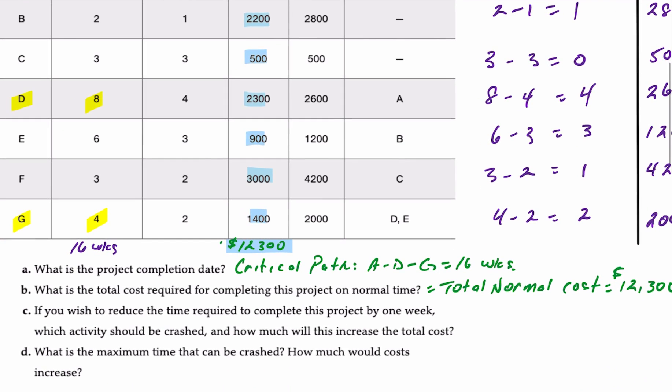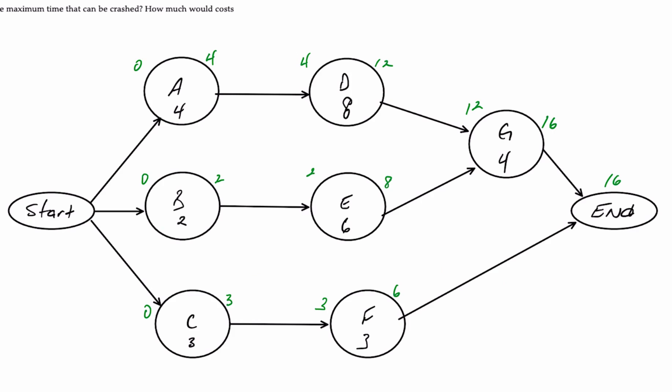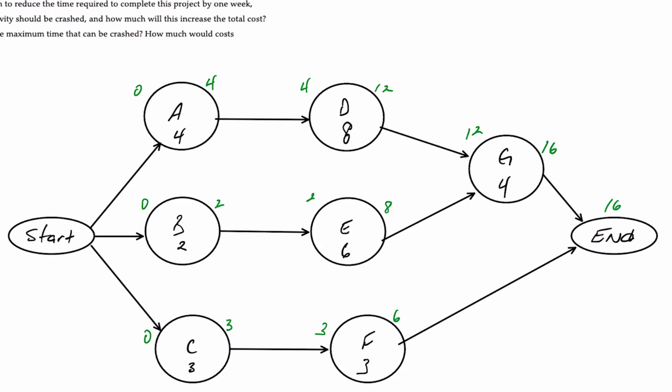Our objectives for the question are: first, determine the project completion date by drawing the network diagram. A, B, and C have no predecessors. D is preceded by A. E is preceded by B. F is preceded by C. G is preceded by both D and E. The project takes 16 weeks with a critical path of A, D, G.